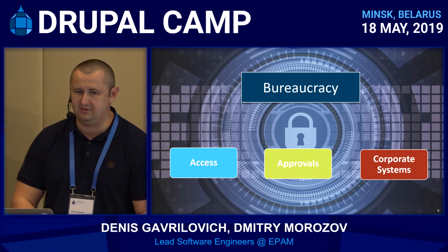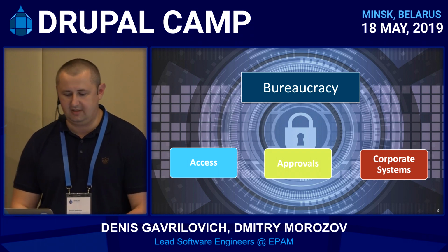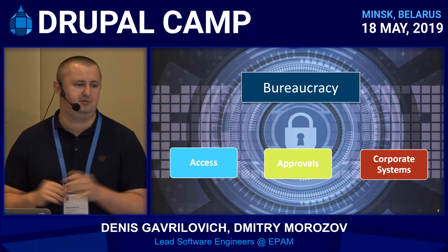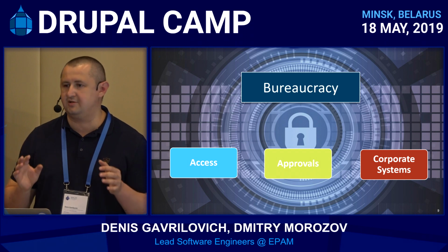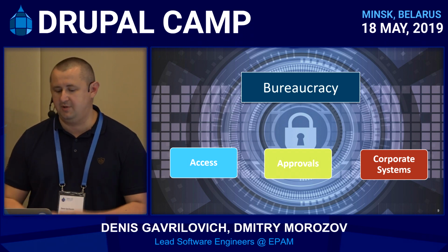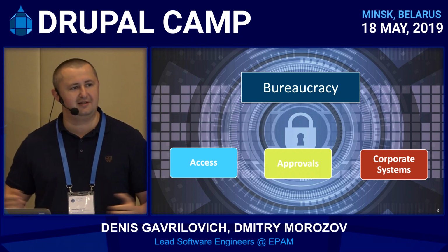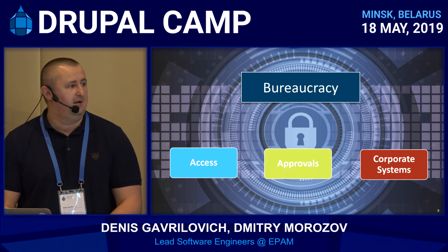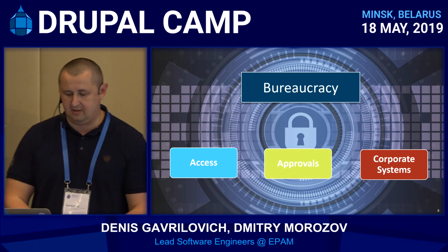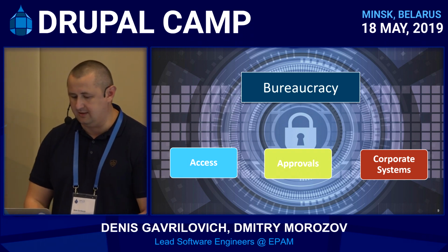And 1 day before the deadline, we found out that yes, development will be completed tomorrow, but this tool will be in production in 1 month, because we have our own release cycle. So sorry guys, development is completed, but you just don't get it. So you have to be aware of corporate systems and the bureaucracy related to them.